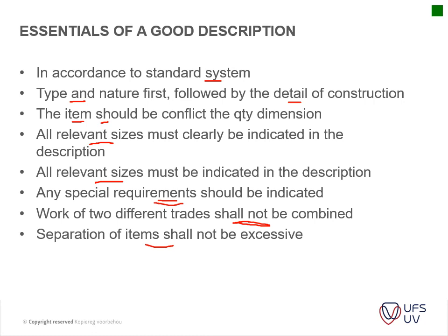That's just going to be too excessive, and the contractor won't be able to actually understand what needs to happen. So if ever you have a special ad hoc manufactured gate, you will have the description usually linked with your drawing or so. You give the size, you might even give the weight of it, and then the contractor should price that as a unit.